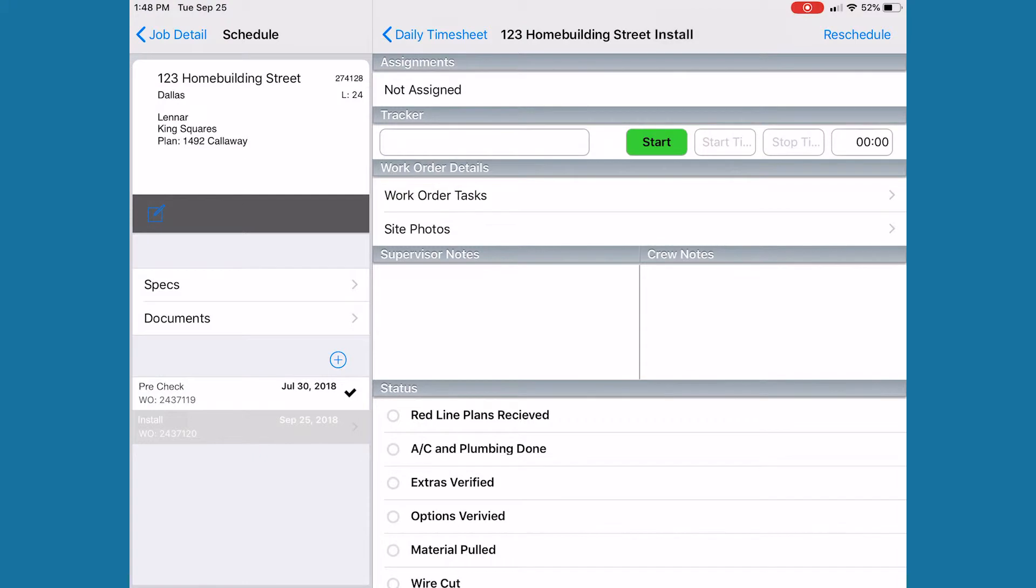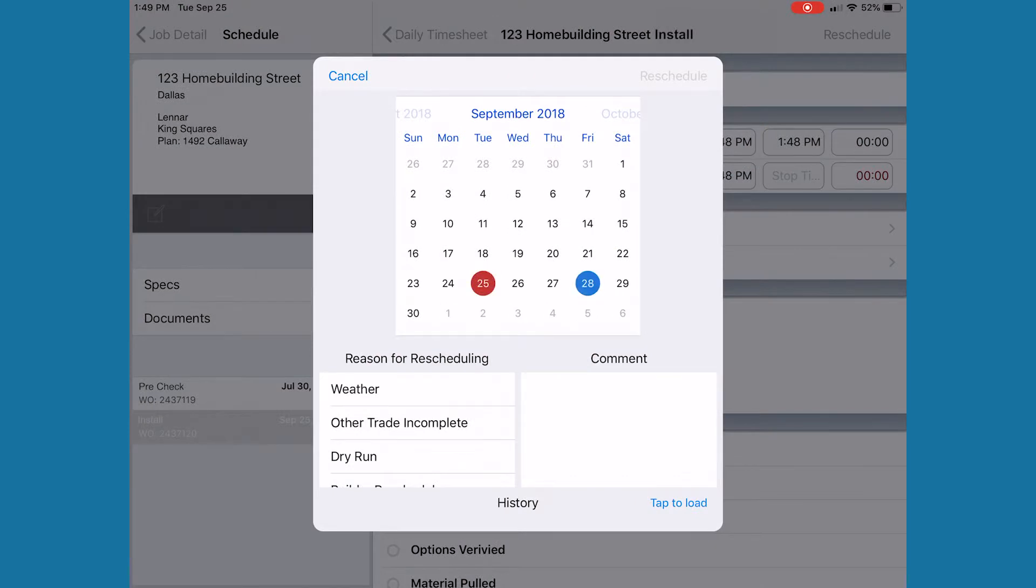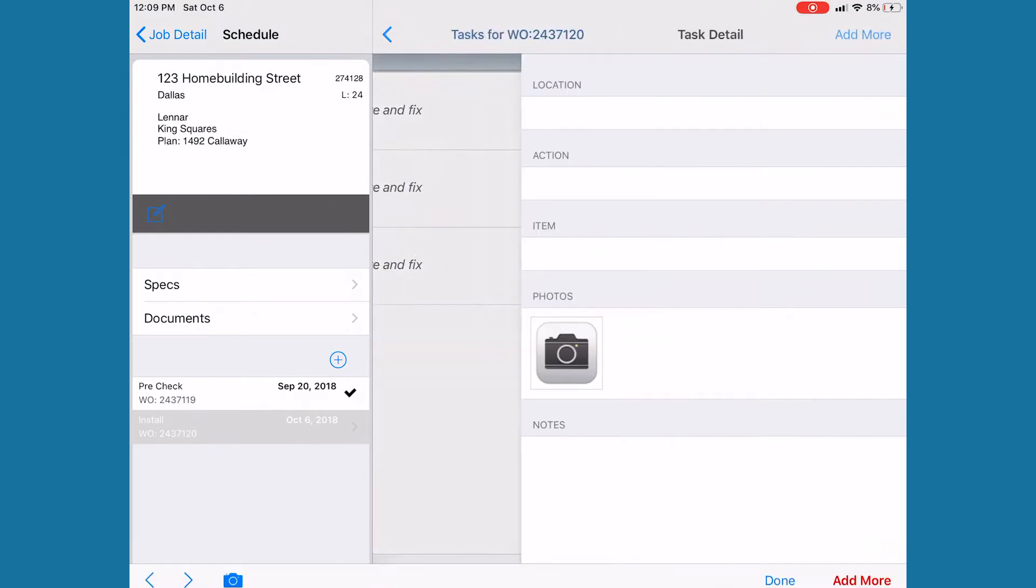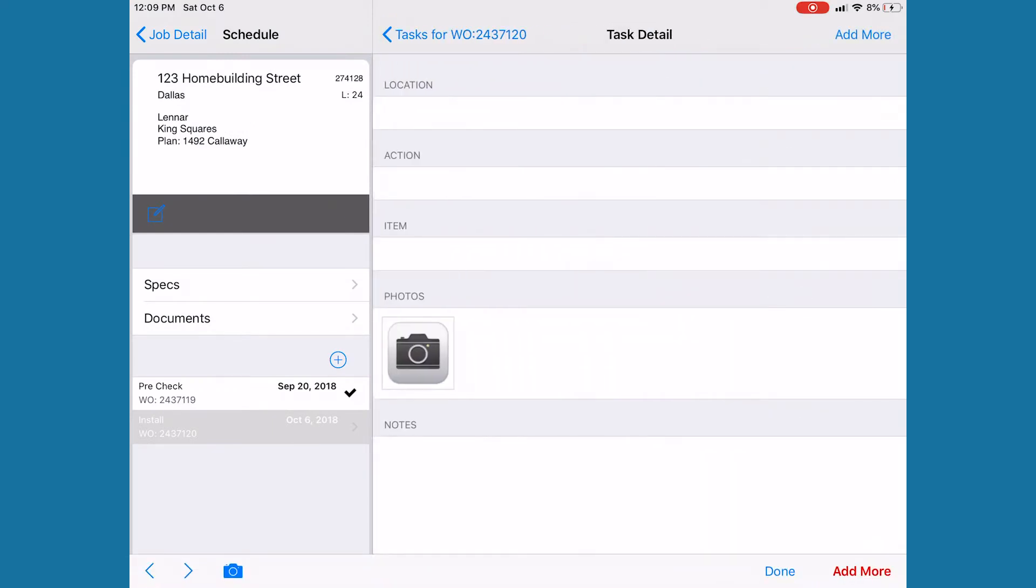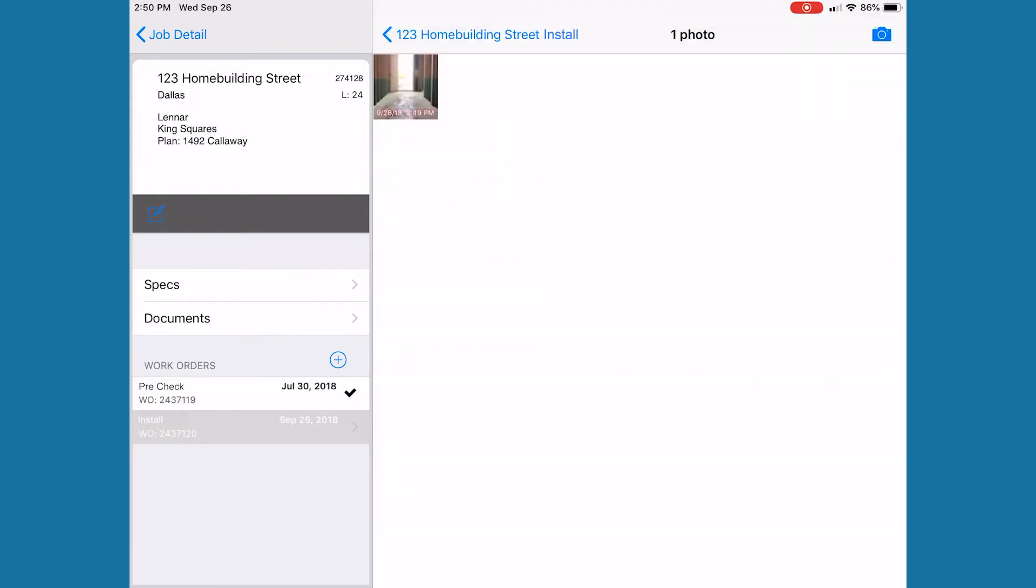When viewing the schedule from the mobile app, you can quickly track your time, reschedule work, track the reasons why you are rescheduling work, create punch lists, take photos at the job site.